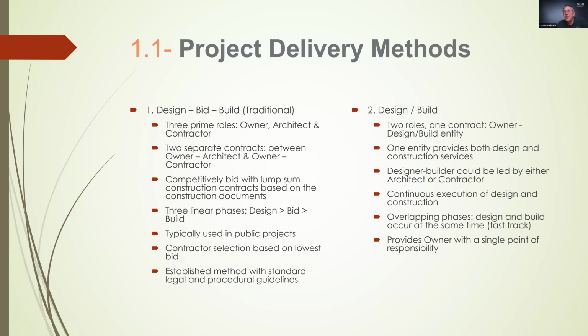In the design build, the owner may opt to simplify by creating one entity, one person, or one team to answer to. And in that case, there can be an architect-led design build or a contractor-led design build. And that one entity does both the design and the construction. In this, there can be overlapping phases.